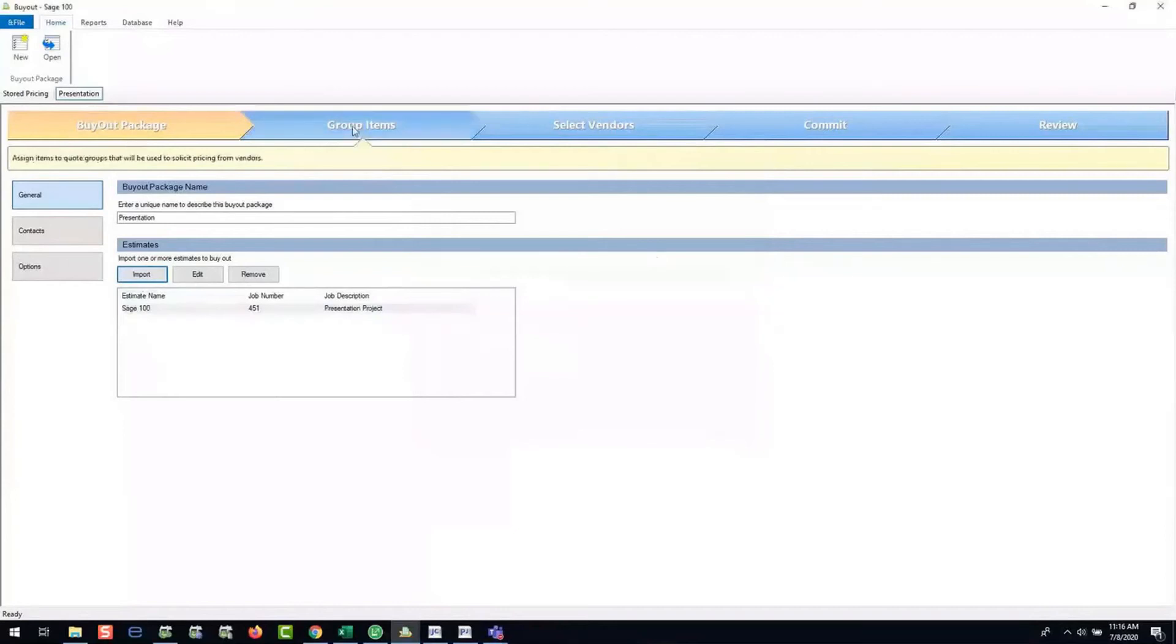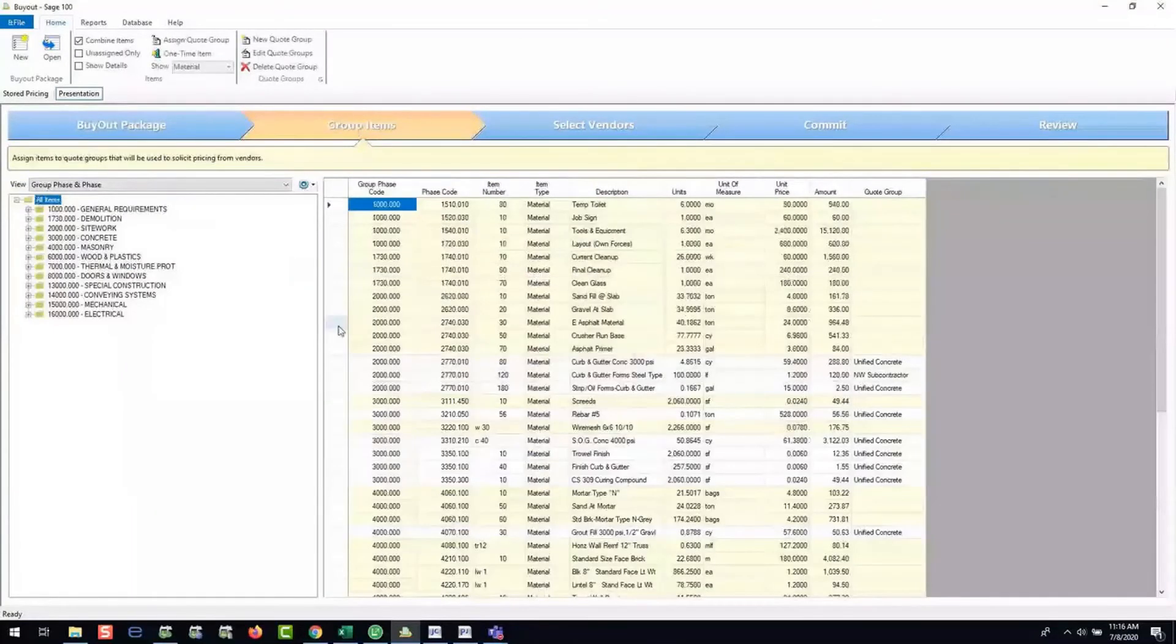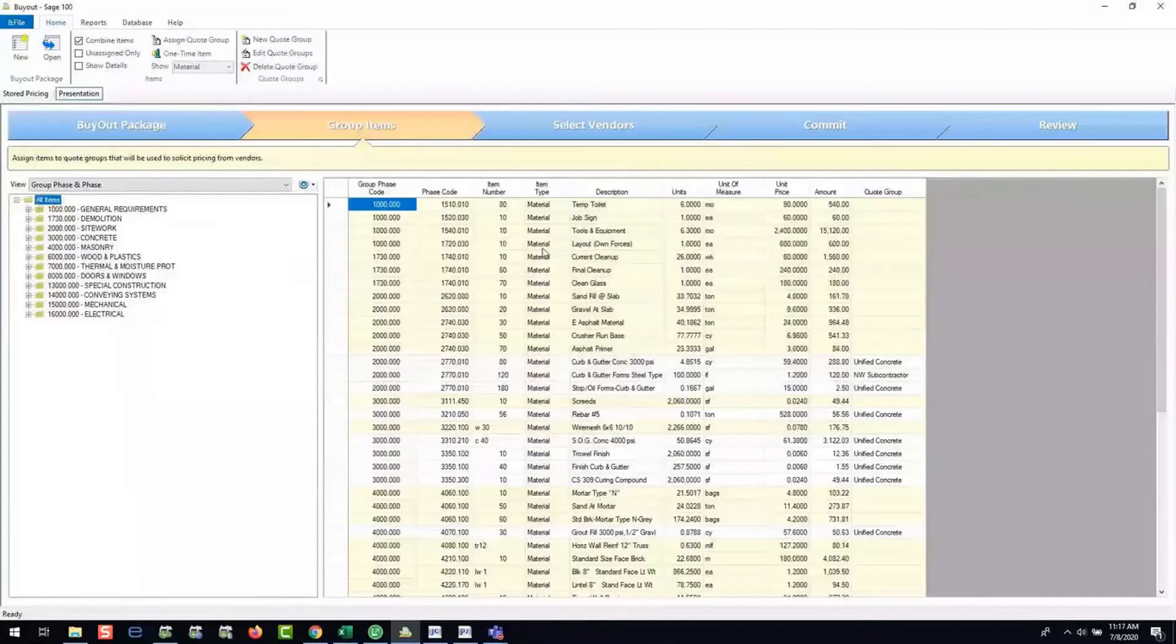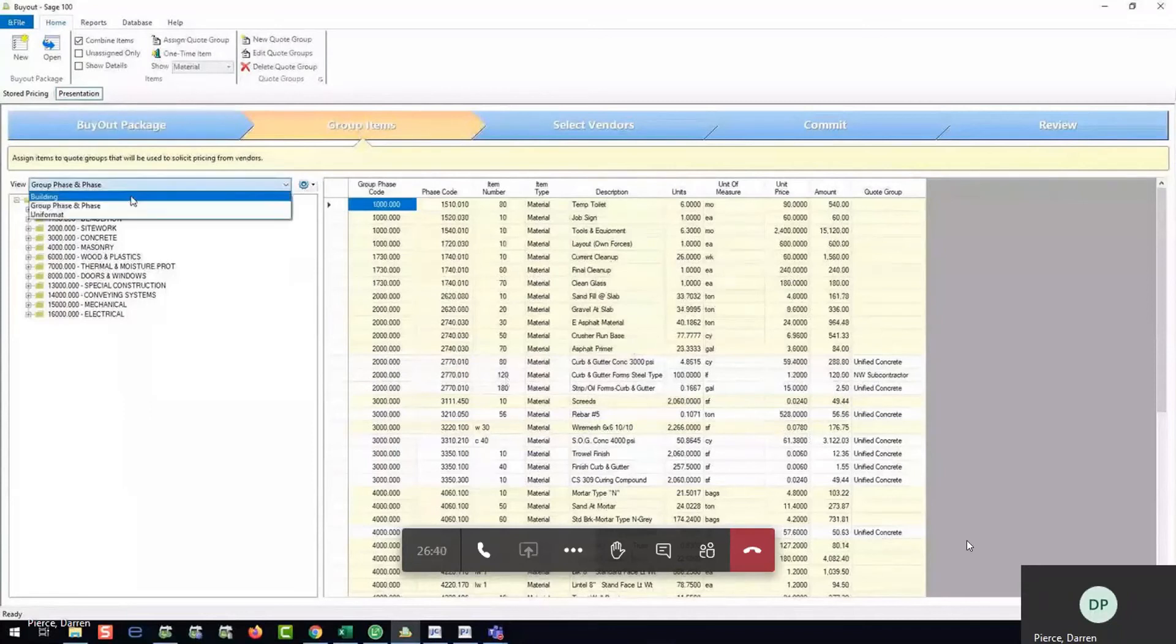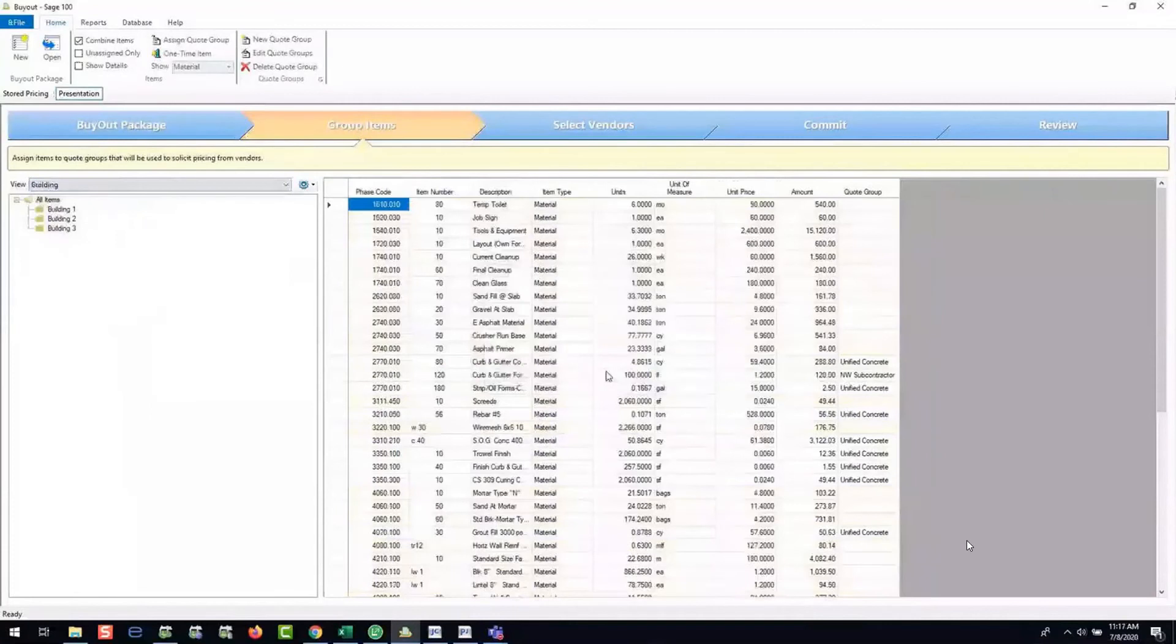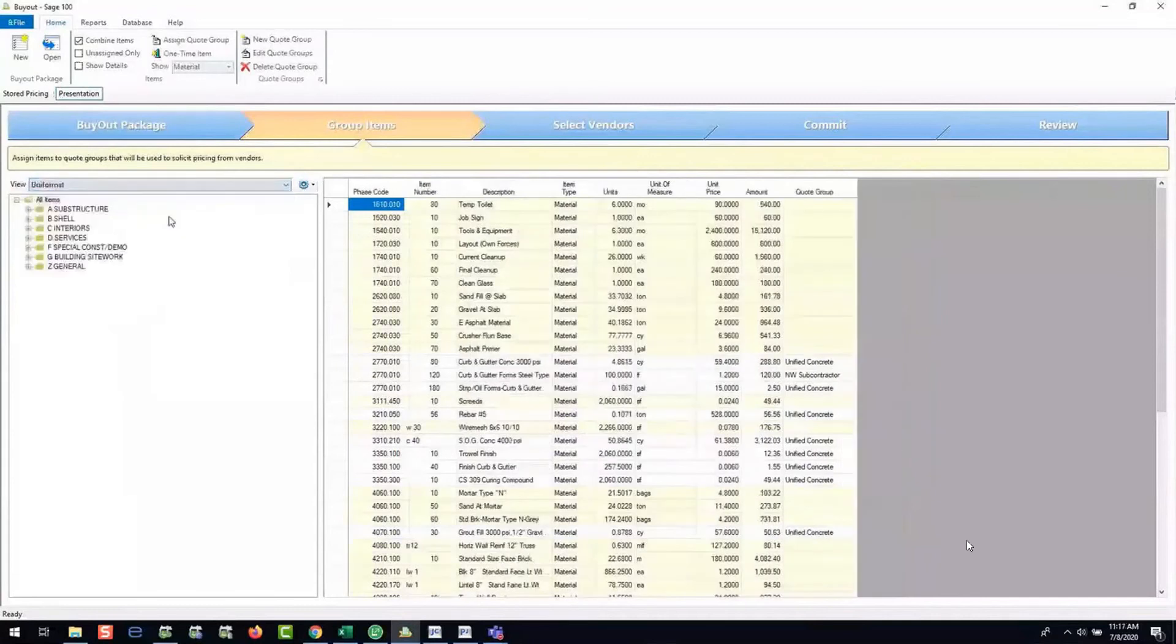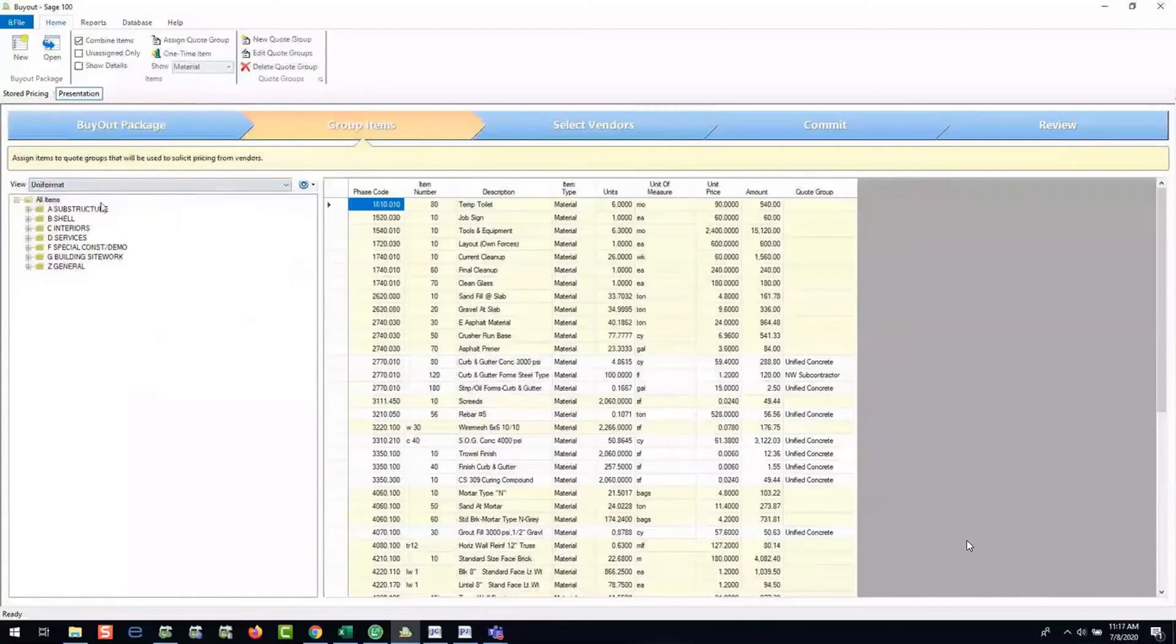As that flows into the system here, now we see all of those particular details, those items that we have. And what's interesting, if you can catch the, I know we're a screen on the screen here, I believe is how we're doing this. So when we look at this, we've got yellowing right here and then we have white. That means it's automatically been grouped in a manner that makes sense to our process. But we want to maybe look at, buy out the job in a different way. As I mentioned, building, we might want to buy it out in building, or we might want to buy it out in uniform at, however you buy out your jobs. Because really, to tell you the truth, it is more a phased approach, right? Downstream from the estimate. We got a big project. We don't want a lot of materials laying out on site, getting stolen, broken, so on and so forth. Now, when I go back to group phase, I may want to just see labor, or material.